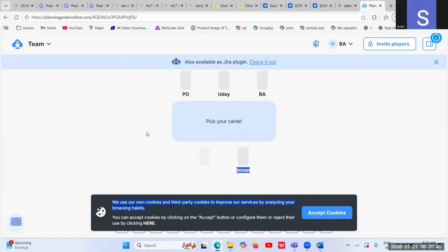Okay. So guys, for your information, yesterday, if you paid attention, the developers will be estimating the user story in the form of the Fibonacci series, which is 1, 2, 3, 5, 8, 13. Now Sapna, as the product owner, has explained the user story and what is prioritized, and now it's time for developers to estimate. They will do it individually. They will update as per whatever they are feeling, in the form of the Fibonacci series.